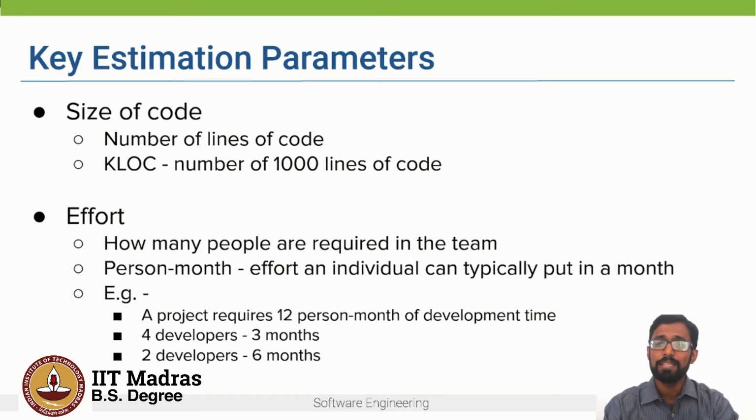You might think it is better to think in terms of total hours. How many hours does the entire project take? But work is often expressed in person month units because it is easier to get a feel for how many people might be needed to finish the development work in a fixed time.